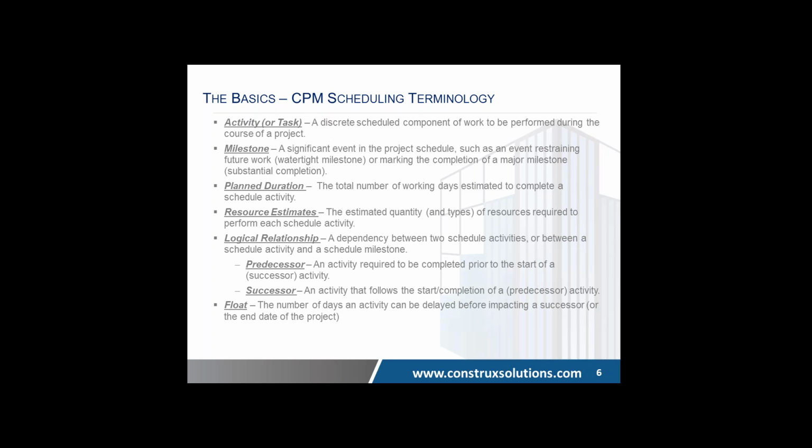That means they don't have to start or finish on the days in which the schedule says that they're starting or finishing. It basically says this activity has a certain number of days that it can be delayed before impacting the end date of the job, and that's what we call float.